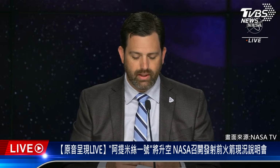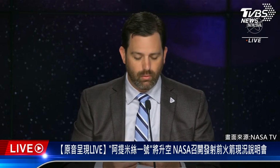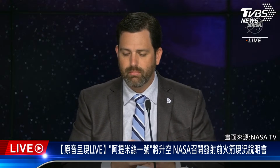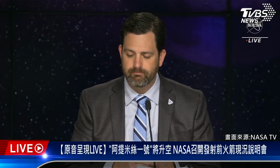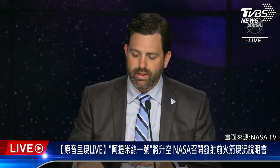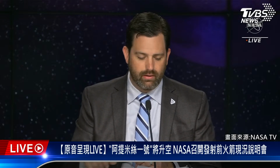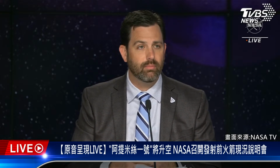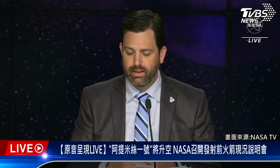That's going to be one of those big milestones that we're going to pay attention to. That will go on for about an hour. And afterwards, we'll be into replenish in terms of our commodities for liquid hydrogen. After that, we have a pre-press test at T minus 2 hours and 20 minutes, bringing the tank up to flight pressure for a period of time. That's really a risk mitigation for when we get into terminal count, so we don't run into any unexpected issues there.